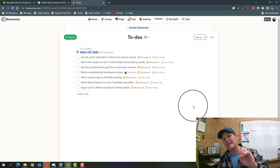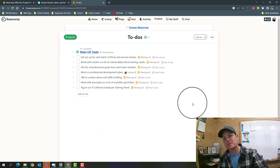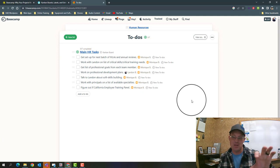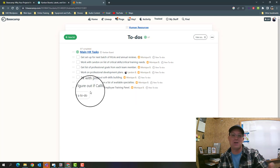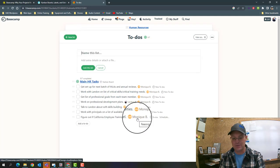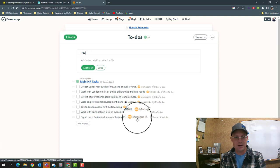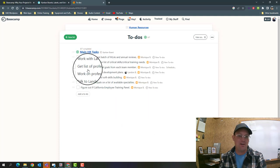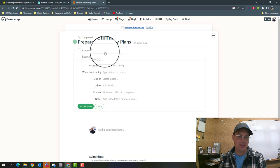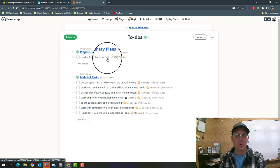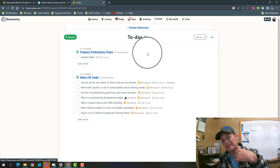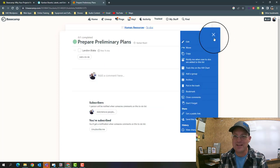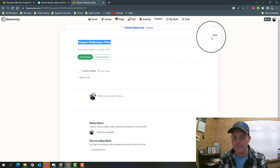It actually connects your to-do lists. Each to-do list in your project becomes a card on the Kanban board in Tracked. Now that's a little awkward for me because I don't typically structure my to-do list that way. What I would normally do is have a to-do list and say 'prepare preliminary plans,' and then I would have a checklist in here for each employee. My to-do list would mirror the list of cards in the Kanban board. But to get this to work in Tracked, that's not what you do.